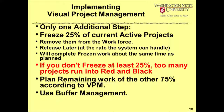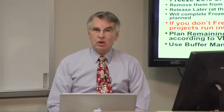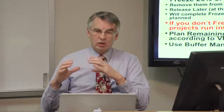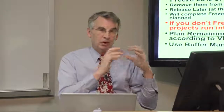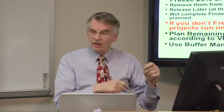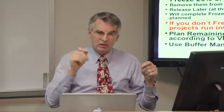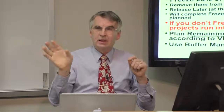We use the term freeze. When you don't have enough capacity to do all the work that you've been assigned, does it make sense to keep pouring more stuff in there? No, it's going to take longer and be unpredictable. So we pull it out, we freeze it. You take that work that you know you shouldn't be doing, you remove it from the system, put it in the freezer somewhere, big file cabinet somewhere, and then you watch it. And then when your system has reduced its capacity and finished some of the projects that are in there, you look at the most important frozen ones and you pull them back out and stick them in.